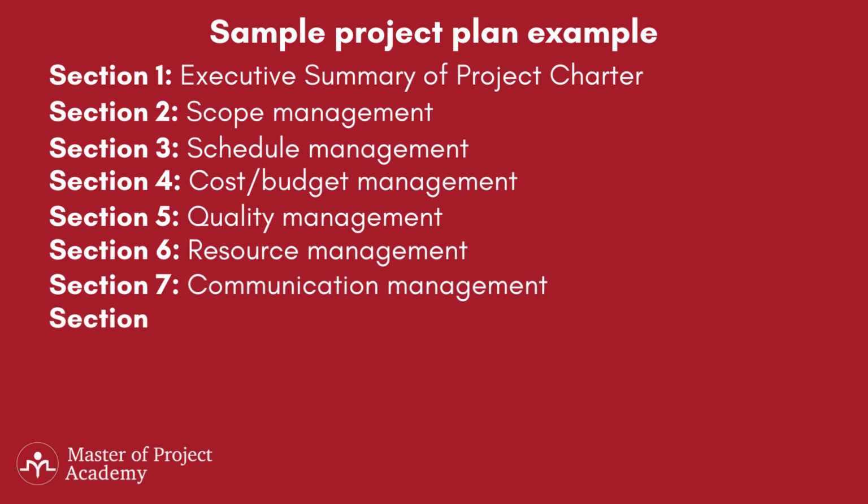Sample project plan example. Section 8, Risk management. This section contains all risks identified in any element of the project. It mainly contains the risk log. The project managers normally maintain a risk log away from the project management plan in a separate document. The project manager may merge different logs into a single document that contains all different logs.